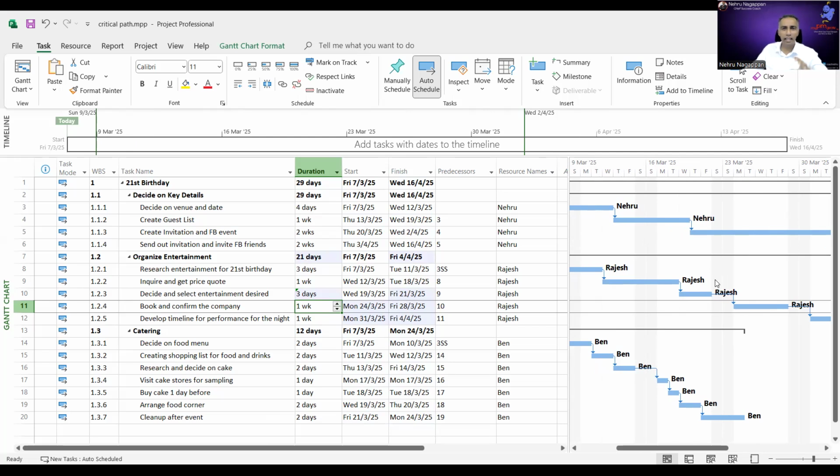Assuming the activity is, Rajesh has to prepare a proposal for me and also supplement it with a PowerPoint presentation: a proposal document and a PowerPoint. These two documents must finish at the same time. Then you submit them to me. These two documents must be completed, then you show them to me. You're not going to show your boss the proposal and then tell your boss, later I'll give you the PowerPoint slides. No, we make sure you finish these two together and then send them to the boss.